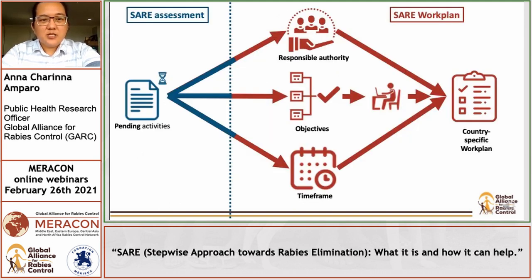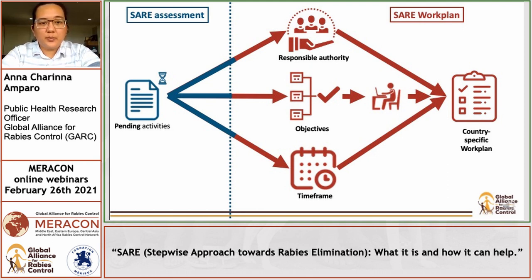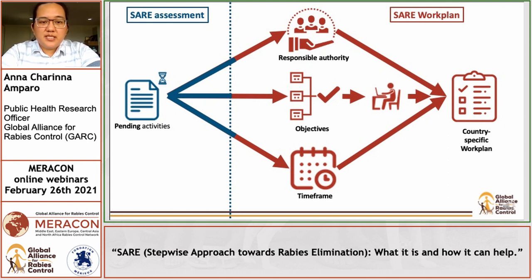In summary, from the list of pending activities in the SARA assessment, the country would need to refine the generic work plan automatically generated by identifying responsible authorities, customizing objectives, and adding a timeframe for each activity to develop their own country-specific work plan.